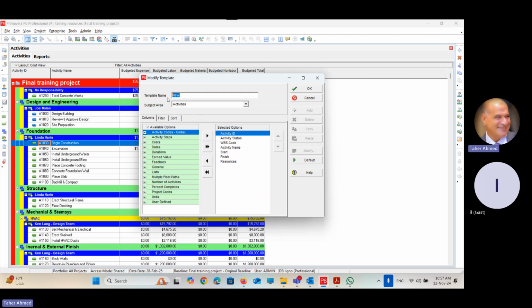The second reason is that I didn't create the schedule yet, and I want to create the activities in Excel. Instead of buying a Primavera license for everyone on the team, I will send the Excel sheet in a proper format to the mechanical people as an example, telling them use this template to create your activities, then send it back to me. I will import it again to Primavera. So the second reason for exporting to Excel is to create new activities.